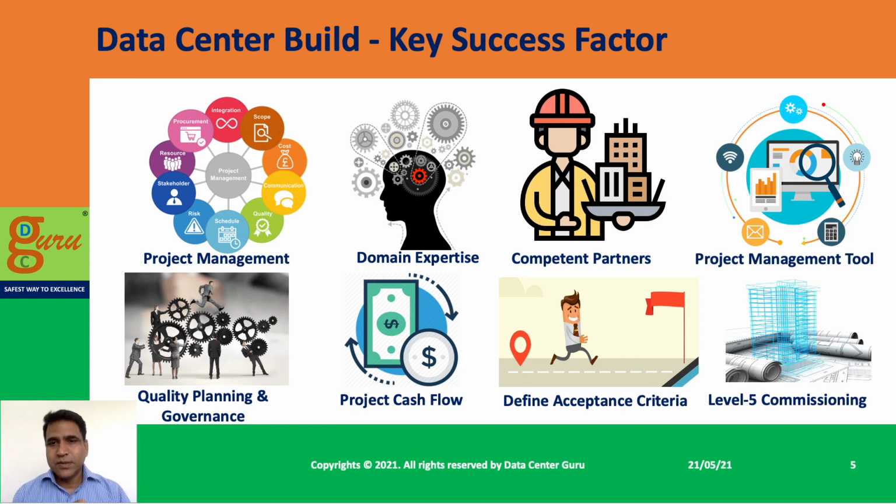And the final part, level 5 commissioning. Again, I talked about the importance in my previous slide: level 1 to 5 commissioning, not just level 5, is very, very important. If you are directly jumping to level 5, you are inviting a lot of trouble. And let me tell you, 90% or more of the projects in India have had compromised outcomes identified during level 5 commissioning, and even a lot of gaps were not plugged and were put under the carpet.